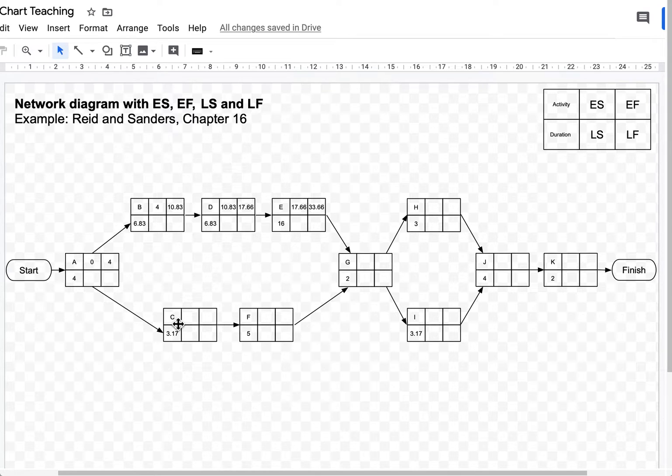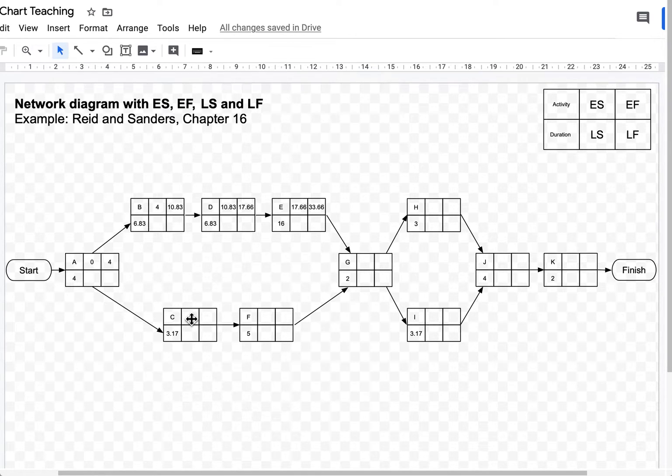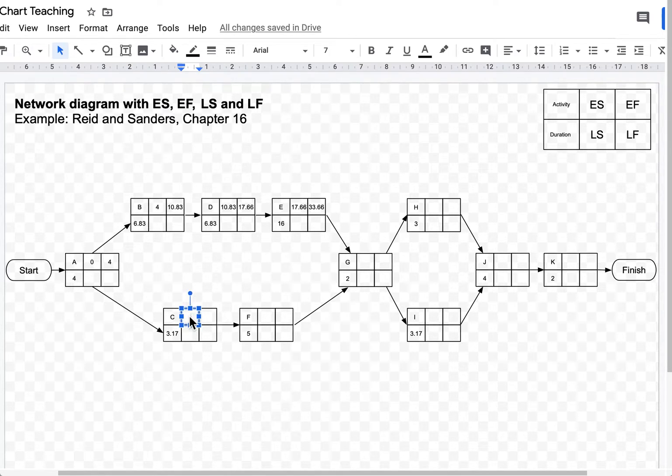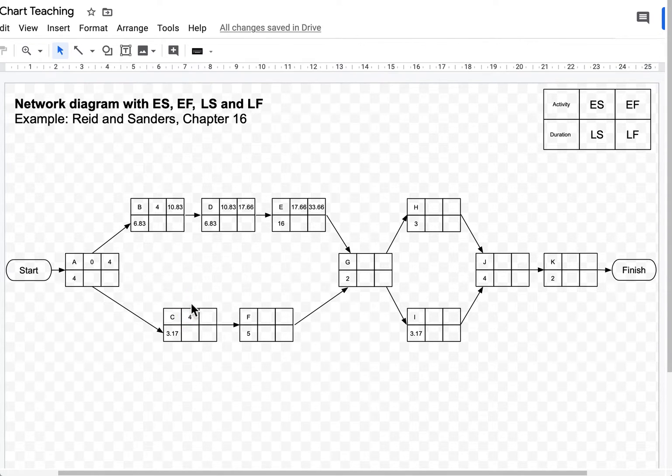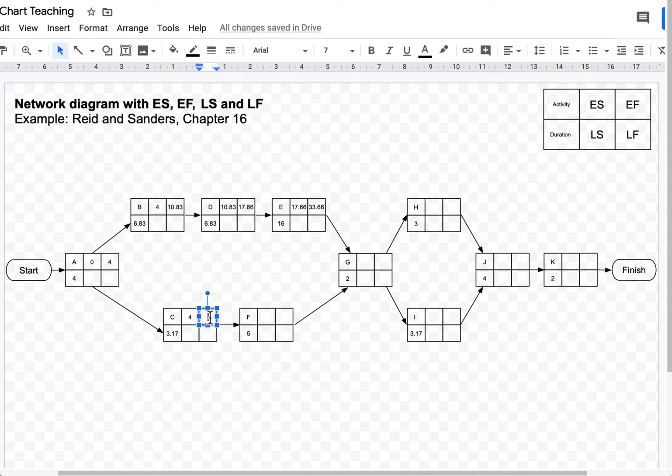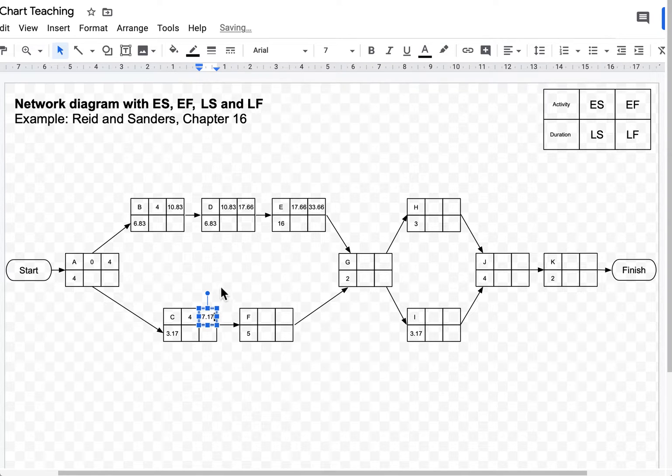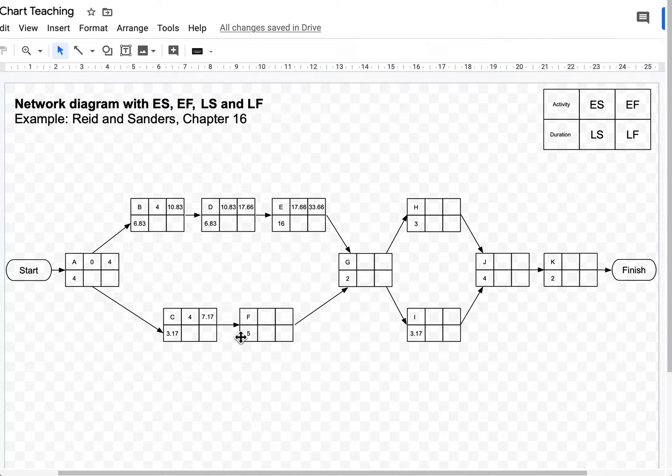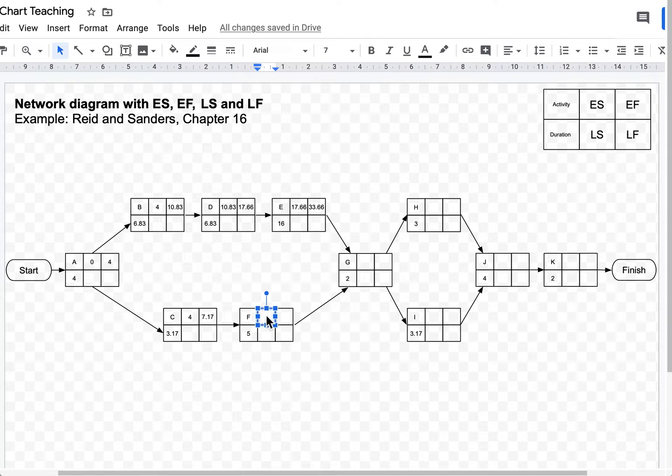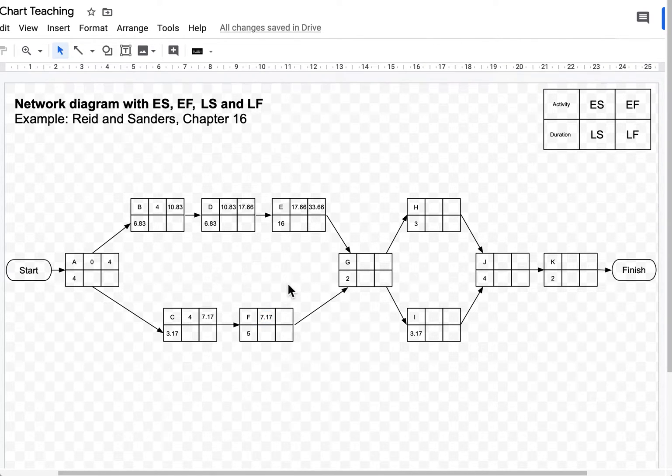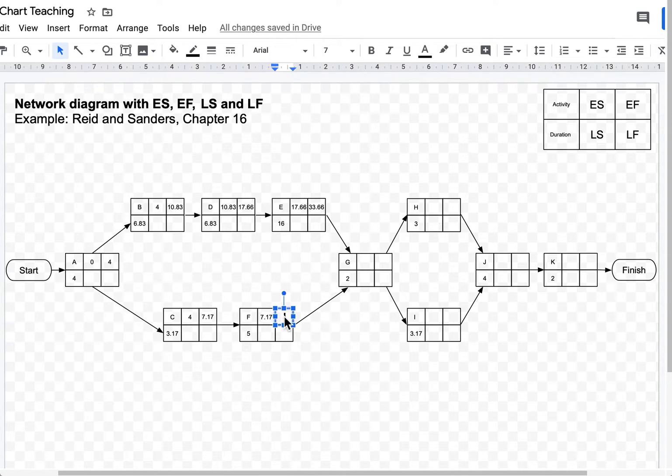Activity C can start just like B in week 4. 4 plus 3.17, that's 7.17. Activity F can start in week 7.17. 7.17 plus 5, that's 12.17.